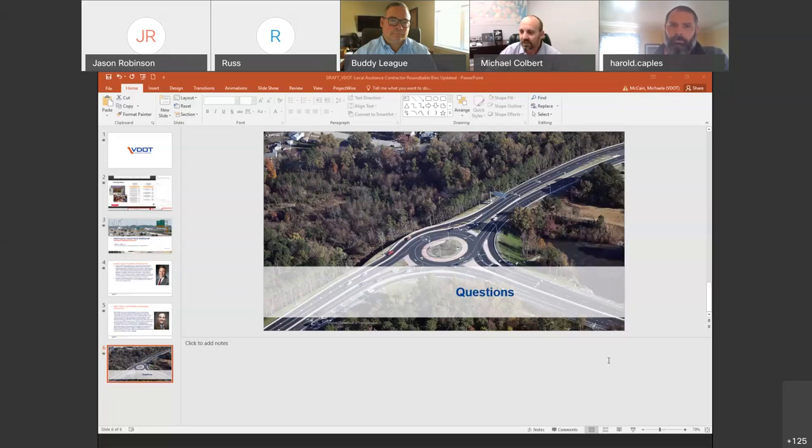So the cost of money comes into play. And like I mentioned earlier, the history of our working with each municipality and their history of payment, and paid if paid. I'll hit on that real quick. I've seen it in a few municipality contracts, especially in the last year or two: paid if VDOT pays it, for example. We'll pay you for that if VDOT pays, or when you get on a job and there's a change in conditions that's compensable, but I don't have the money as the municipality. I can only pay you if VDOT pays me. So that goes into the equation.